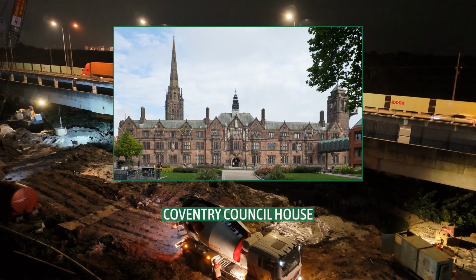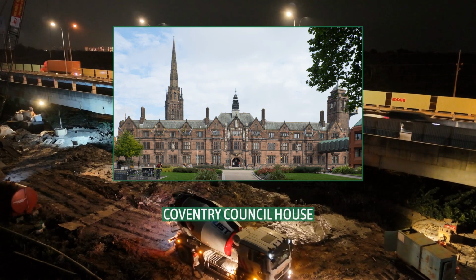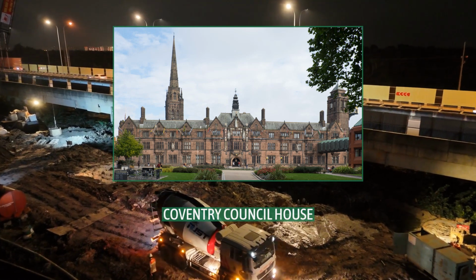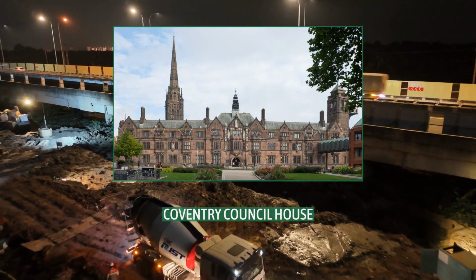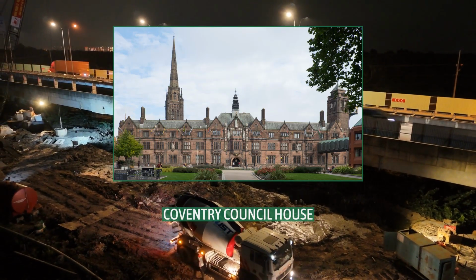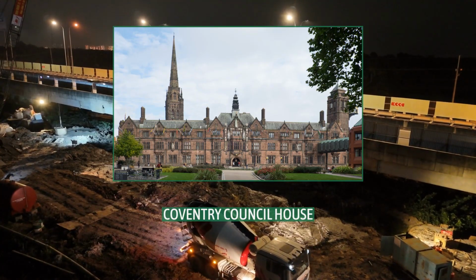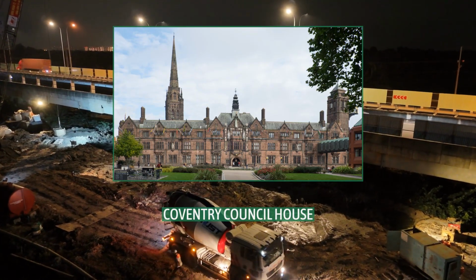The foundation consisted of at least 6 inches of crushed stone, with 4 inches of lean concrete above it, topped with 8 inches thick concrete slabs. The surface was tarmac, which contractors began laying in early September. With one carriageway fully tarmacked by late November, the council considered opening that side early, around 8 December, but ultimately they decided to open both carriageways together.